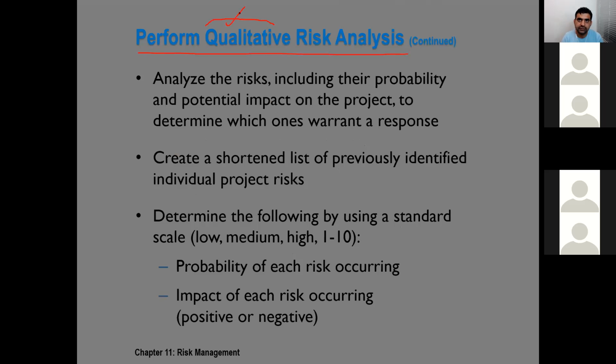For some projects that are very risky, or very, very important, or where human life is at stake or essential money is at stake, we may go for quantitative analysis. However, quantitative analysis is time consuming. It is expensive as well. So for most of the standard projects, only qualitative risk analysis is enough.